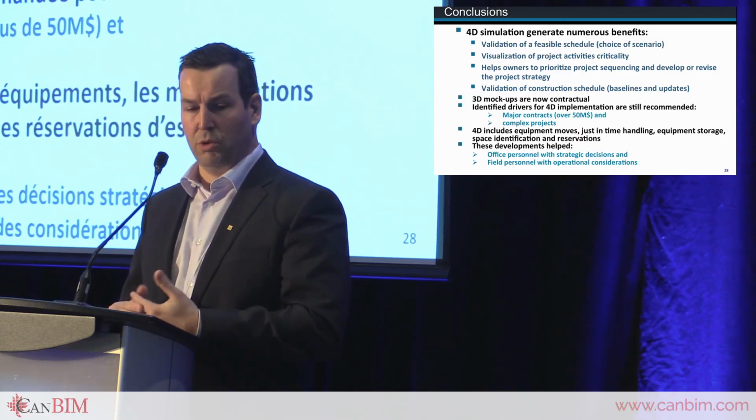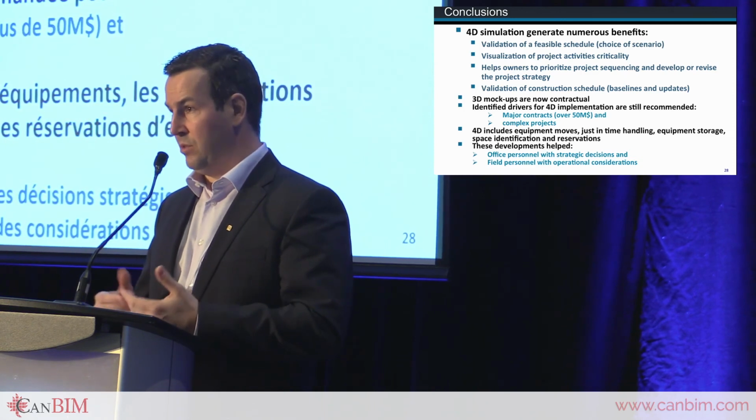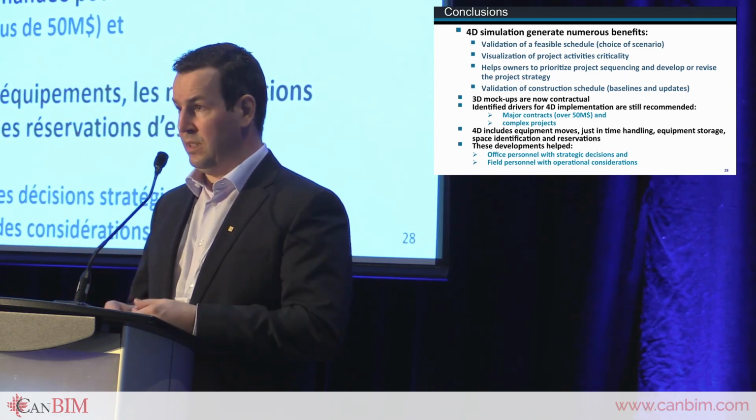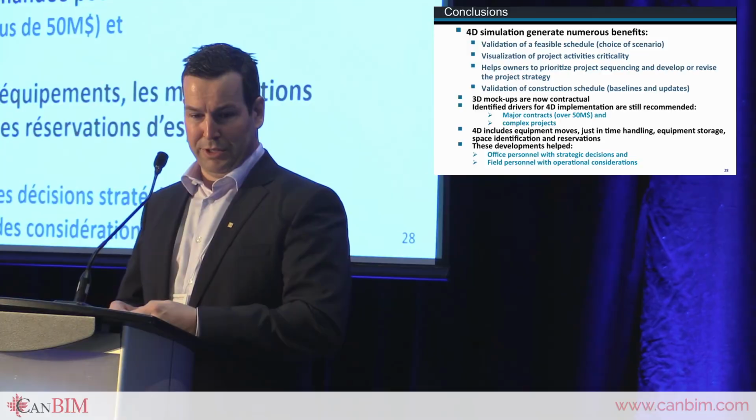In terms of implementation, we do this a lot for contracts that are over $50 million and that are complex. That's where the biggest value added lies. And of course, we include everything I've already mentioned, moving equipment, just-in-time handling, storage, and reserving space.